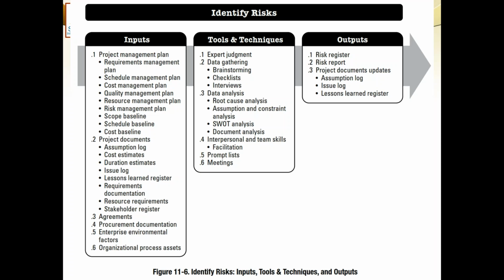There are a few other things which could be included in the project management plan, like configuration management plan, change management plan, the life cycle approach, the development approach of the project. So these 3-4 things can further be included in the list of ingredients of the project management plan. And these are the things during the planning process group; all of these items which we just enumerated actually go and form part of the project management plan.